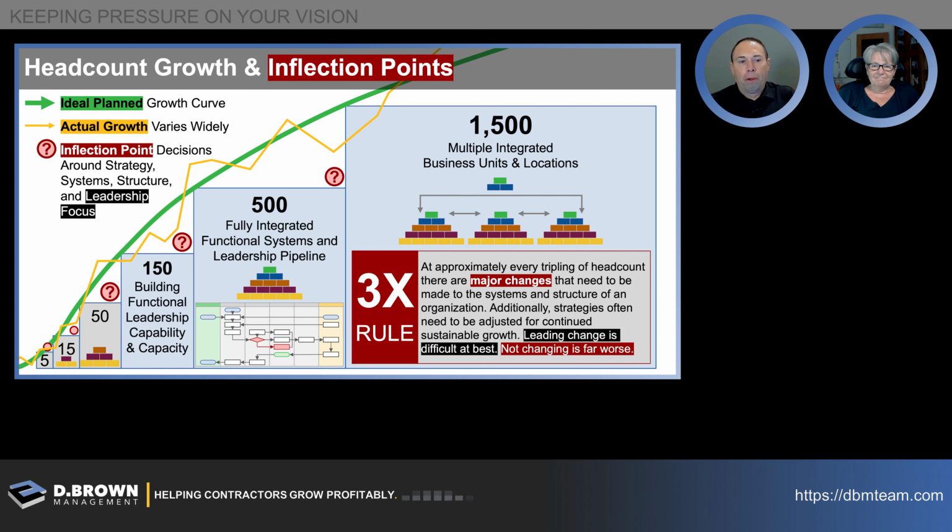And if there's no problem, no big deal. It can go on and on and on. However, one single problem with one change order, unpaid or turning into a claim or something like that, can cost you hundreds of times what the cost of the quality control, quality assurance was. So that was my first inflection point.